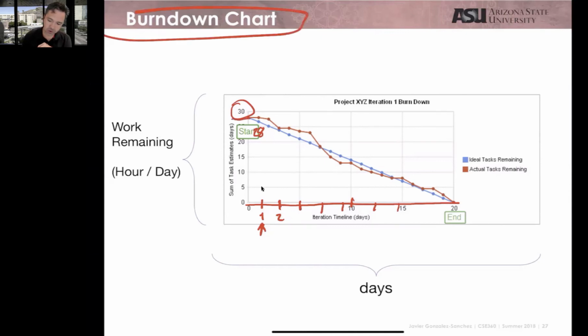We know how many requirements we think we can finish. The chart is going to be like, well, we're planning to work for 20 days or 10 or 15. I mean, again, the size of your sprint. And therefore, the logic is, well, we start with 30, and at the end of our sprint, the goal is we finish everything. So from 30 flat, aligned to 0, that is the plan.